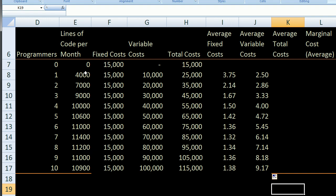When you add a third programmer, you're only adding 2,000 lines of code. This is a real phenomenon that happens in companies. The more people you add to a project, there's more coordination, more meetings, more interruptions, and each person's individual productivity goes down. This isn't to say the third coder is worse than the first — it's that on average, all three now produce only 3,000 lines a month each when individually they might each produce 4,000. They have to spend energy coordinating. That's why average variable cost per line of code goes up — as we add more people, it becomes incrementally more expensive to write each line of code.